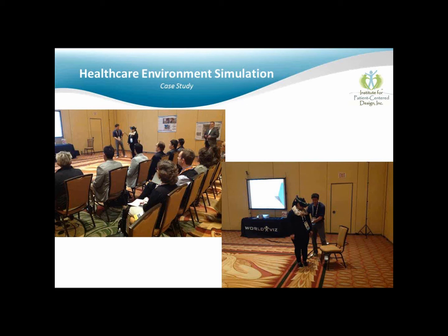Okay, and I think you may have touched on the answer to this one. How long does it typically take from getting a BIM model to viewing into VR? Yep, and of course, depending on schedule and depending on the model, how it's presented to us, anywhere from a half a day to about a week. It typically won't take us longer than a week, even if it's just a terribly messy file.